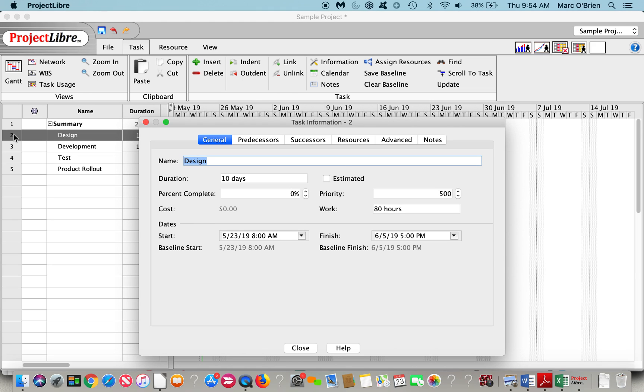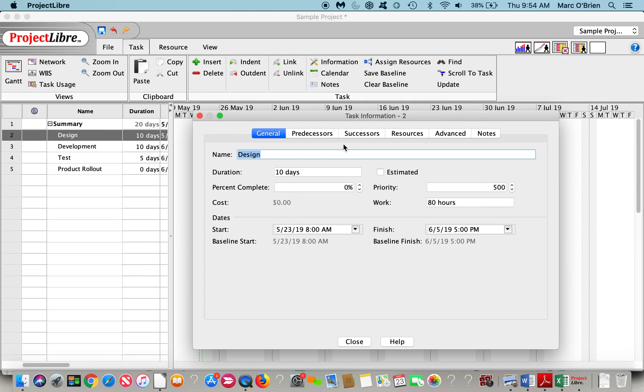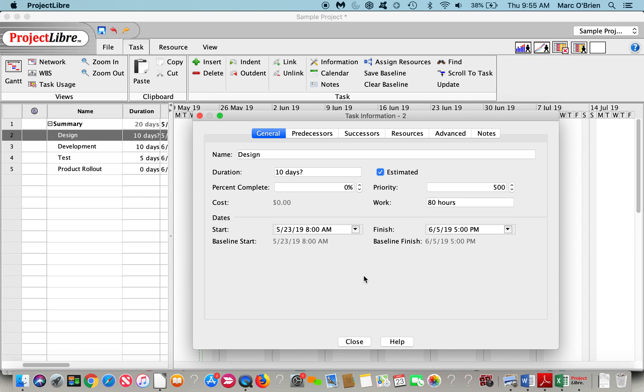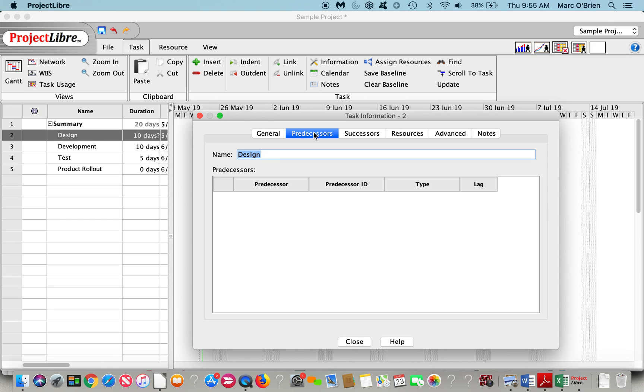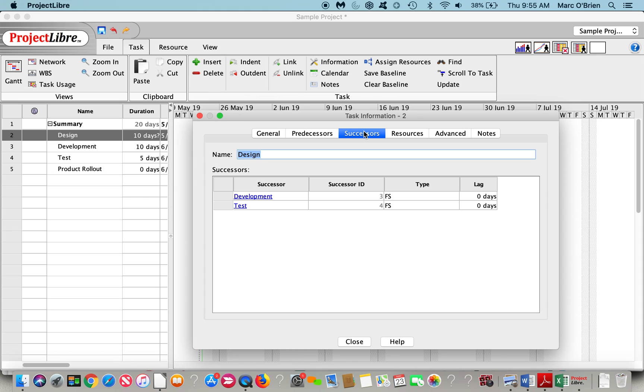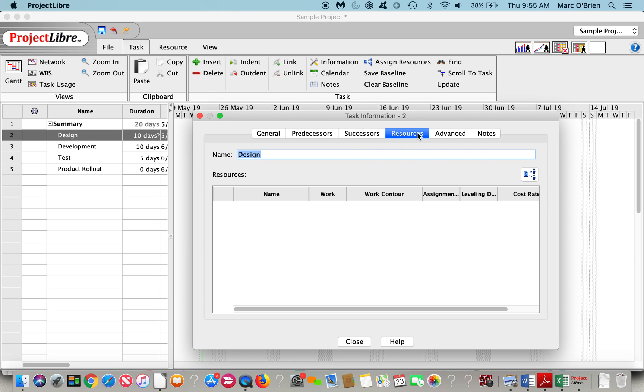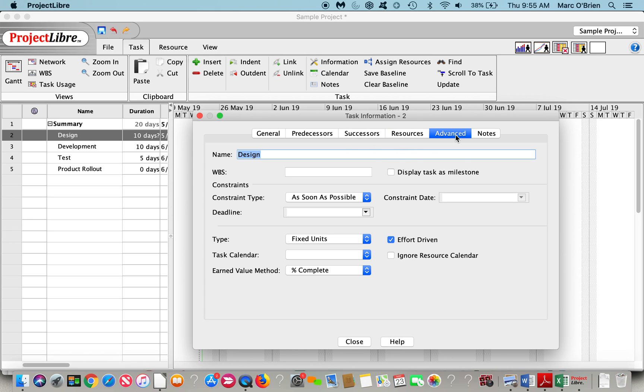If I click on one of the tasks, I get the task detail dialog box. It shows the duration, the percent complete you could enter here, the priority defaults to 500. We could go back to estimated, and the question mark pops up again, and the costing on it, etc. You can also see what the predecessors are, the successors in this case, and we can modify these.